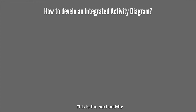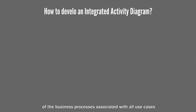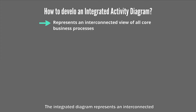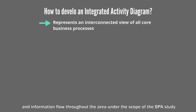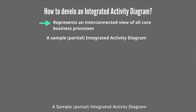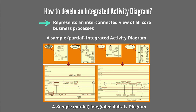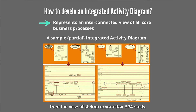Next, the process analysts should develop an integrated activity diagram. This is where process analysts work together to integrate all activity diagrams of the business processes associated with all use cases defined earlier into a single integrated activity diagram. The integrated diagram represents an interconnected view of all core business processes. It illustrates relationships between core business processes, process participants, and information flow throughout the area under the scope of the BPA study, as shown in the partial integration from the Shrimp Exportation BPA study case.